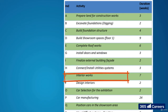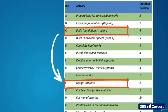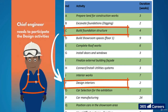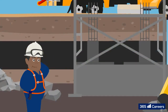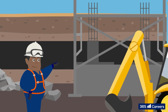For example, F design interiors must follow C build foundation structure. These do not seem dependent; however, the chief engineer needs to participate in the design activities, although he will not have the available time before the main part of the construction is done. This makes it a resource constraint.